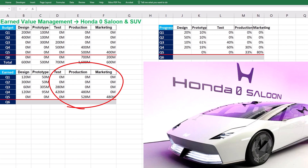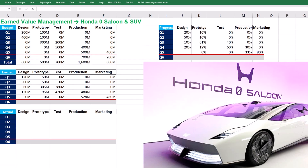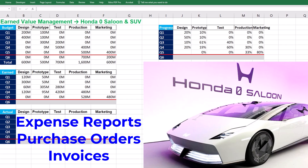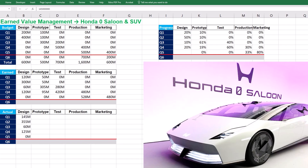In the next step, project control and monitoring teams must find actual costs incurred for the work performed. Actual costs are related to materials, equipment, labor, and services, which should be tracked through expense reports, purchase orders, and invoices. Design, for example, has incurred $145 million in costs during Q1. The actual costs for other project activities are tabulated here.